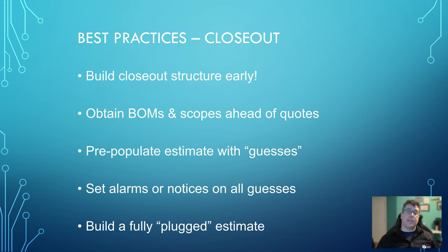Don't get blindsided by a supplier who comes to you on the day of closing and says, "Actually, those four critical light fixtures, there's a thousand of them in this building. Yeah, I can't supply you those." Those are the blind sides that you really, really want to avoid. And the only way to do that is close, tight engagement with your suppliers, with your sub trades during the estimate.